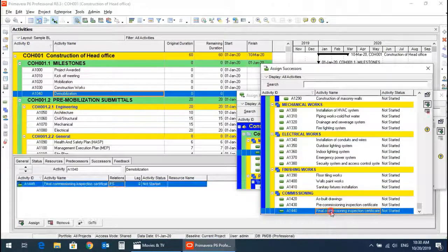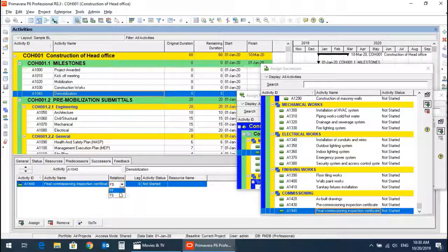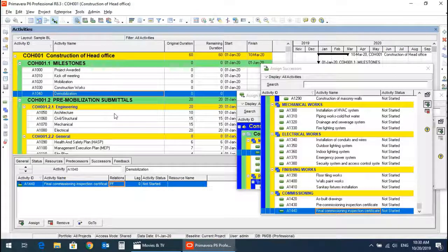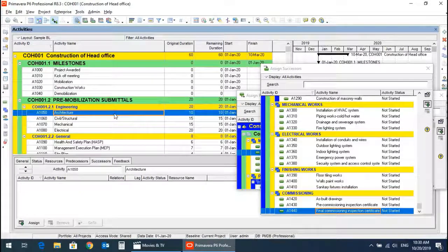Demobilization is the finish milestone and should have a successor of final commissioning with a finish-to-finish relationship. Both final commissioning and demobilization will finish on the same date. Now we will assign predecessors and successors to the normal activities.